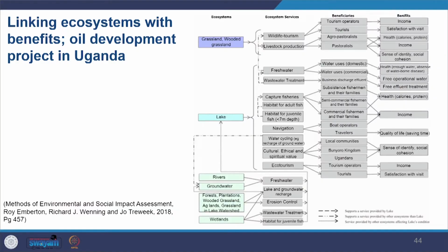This will ensure the ecosystem service review is framed well, so the review you're planning addresses the key issues and concerns of the stakeholders. When you engage them early in the stage, it ensures that their agendas are included here. It is advisable that you engage with stakeholders at the earliest stage possible to obtain essential information in social and ecological surveys, else you'll be out of time at a later stage.